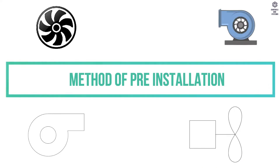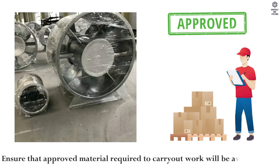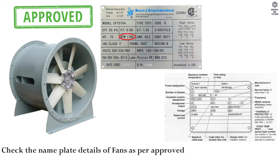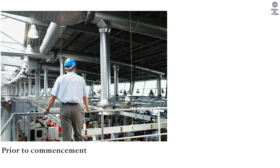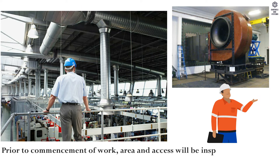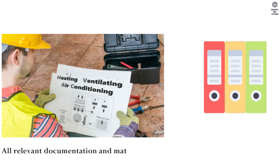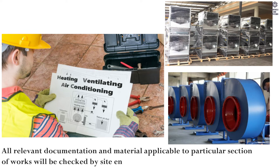Method of pre-installation: Ensure that approved materials required to carry out work are available. Check the nameplate details of fans as per approved shop drawings, schedules, and material submittals before installation, prior to commencement of work. Area and access will be inspected to confirm that the site is ready to commence the work.